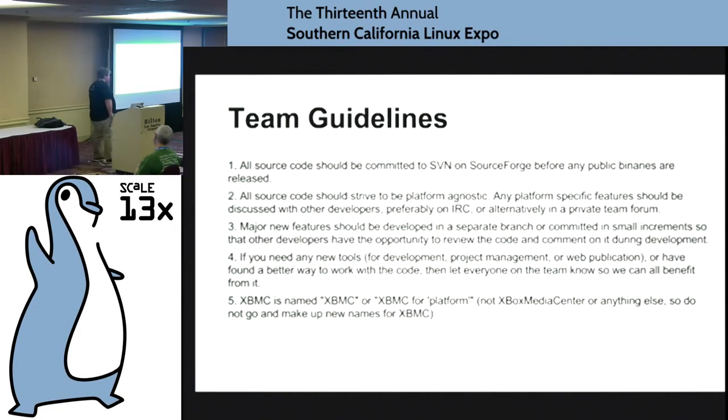They didn't have the ability to push to SVN, and so rather than communicate that problem, or rather than having all the groups discuss how to resolve it, all they did was just go on to GitHub, because GitHub was easy and everyone was used to it from that team. And that's fine, but because that was the way it was, it made it very difficult for the two groups to match up their code at any point, frankly. And so the Linux port went a certain way, the Mac port went a different way, and they only started to merge every once in a while when code was released.